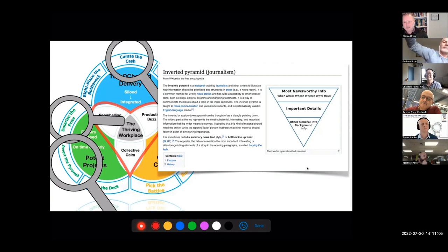And we ran through the calculations, and it was going to give the equivalent of 0.5% to 1% extra percentage points of profit per mortgage customer. They had several million mortgage customers who were all paying a lot of money. So we worked out that it was worth between 1 million and 10 million, which is a big range, but also an interesting number to play with. 1 million and 10 million pounds a week. And we were delaying the project, debating over $200,000 or $300,000.